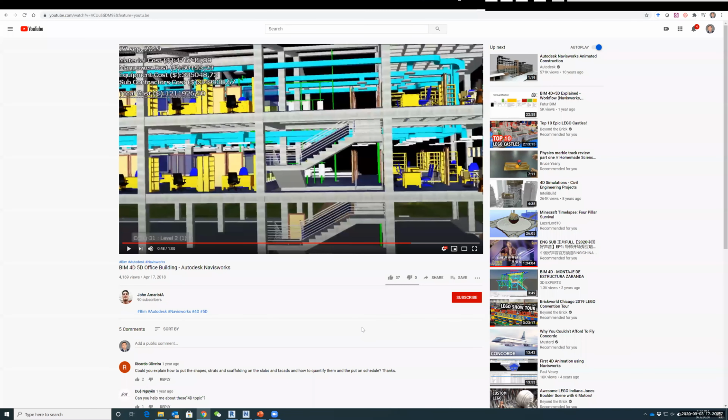They don't talk to each other. So that's why you want to play the video and let them know, now we are putting in this conduit, so drywall guys don't come now. Make sense? This is the tool for you to coordinate efforts across different teams. That's the number one reason for 4D simulation. Make sense, guys? Yes. All right.